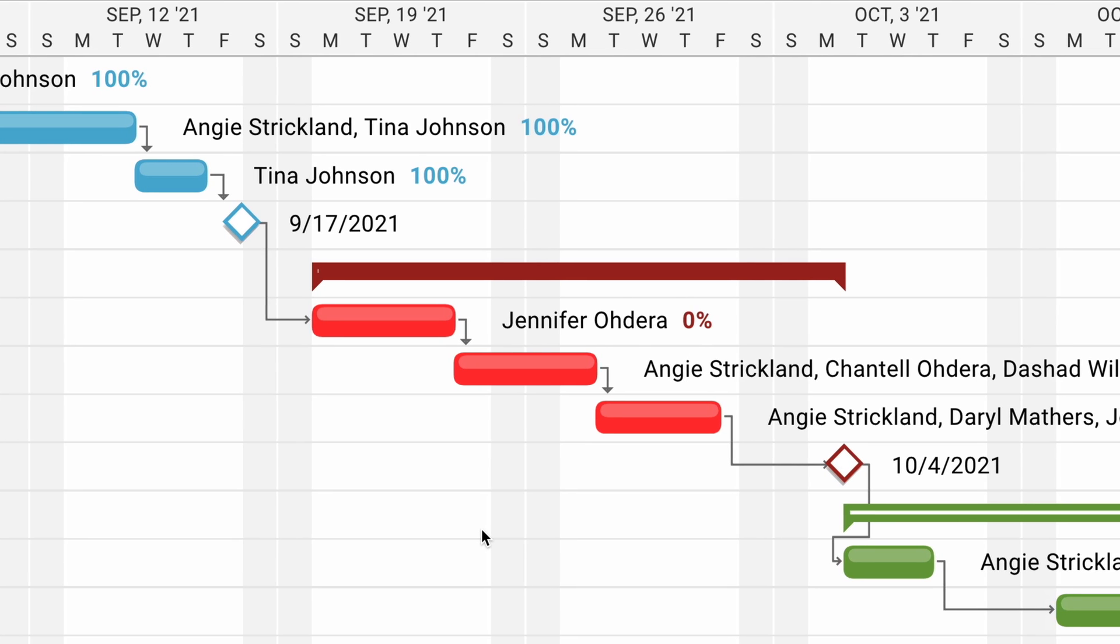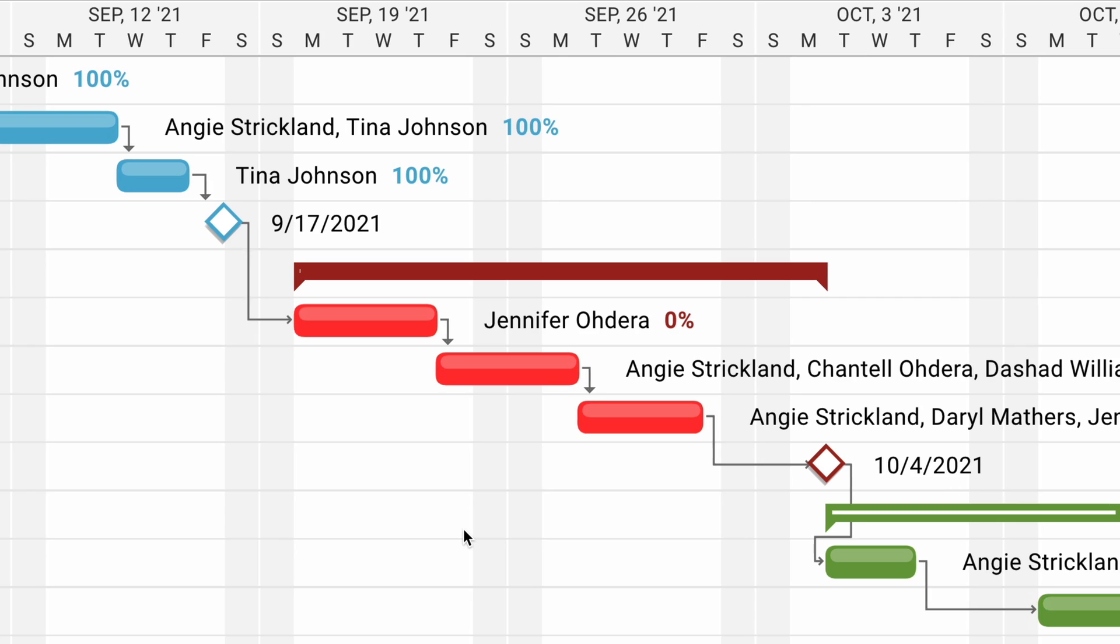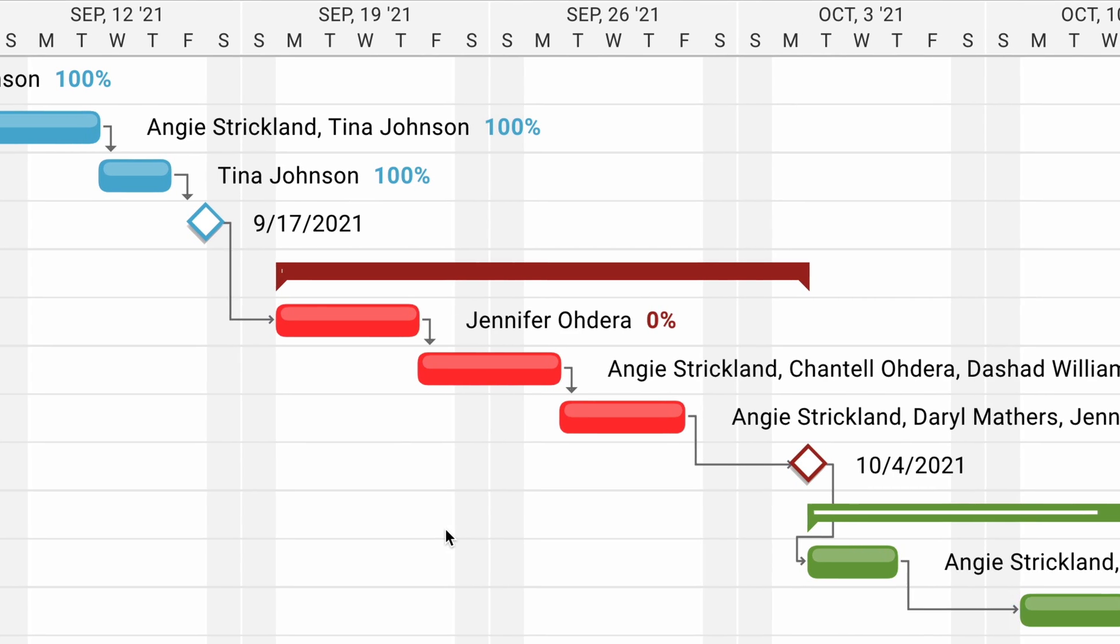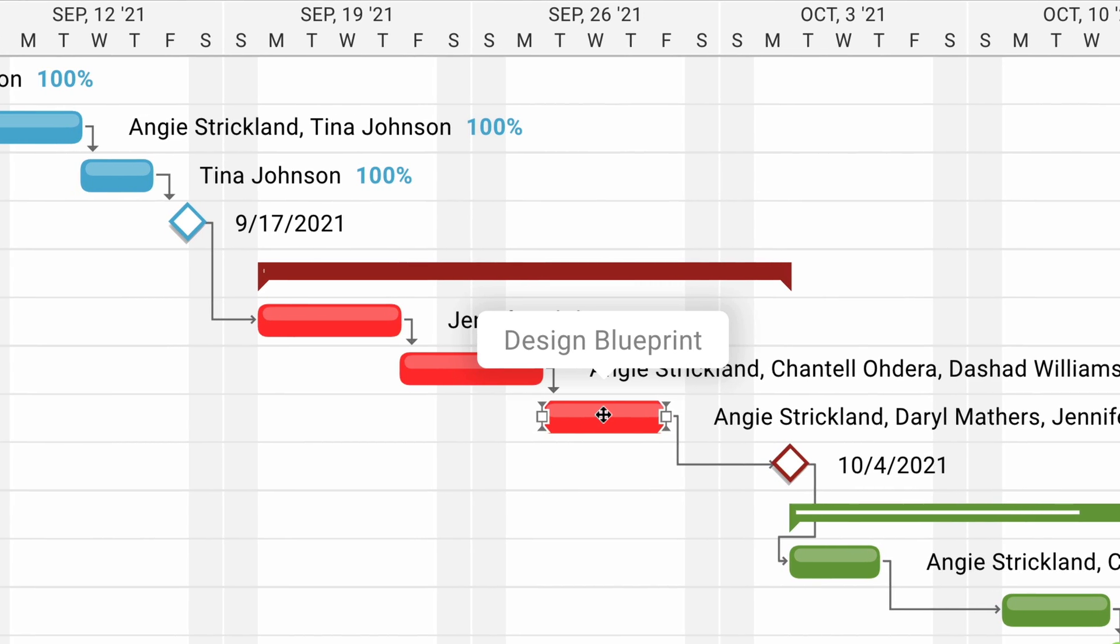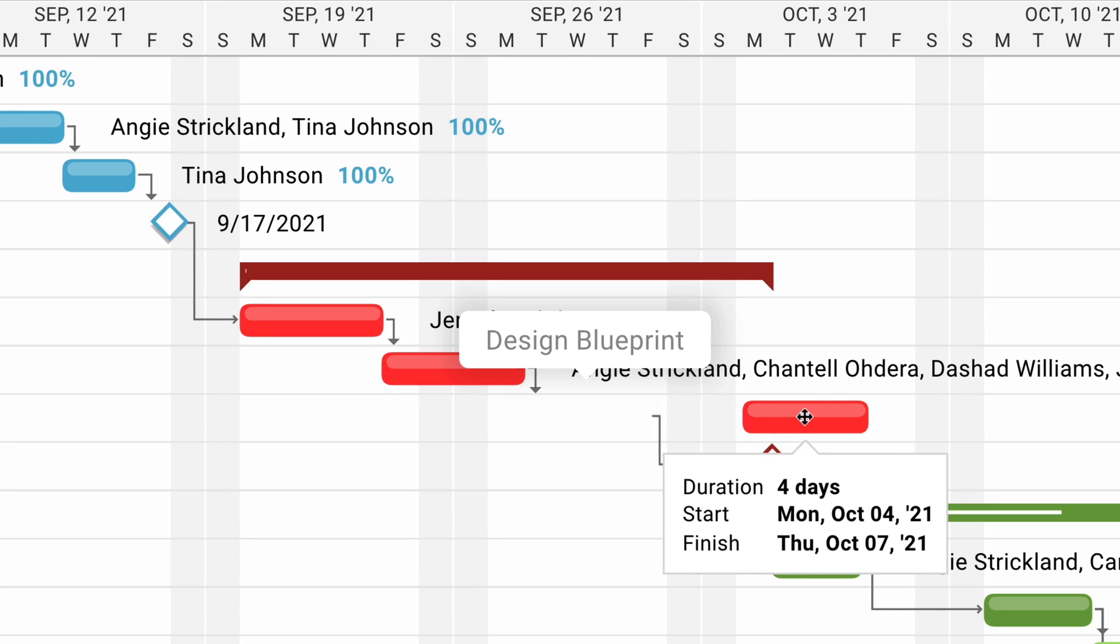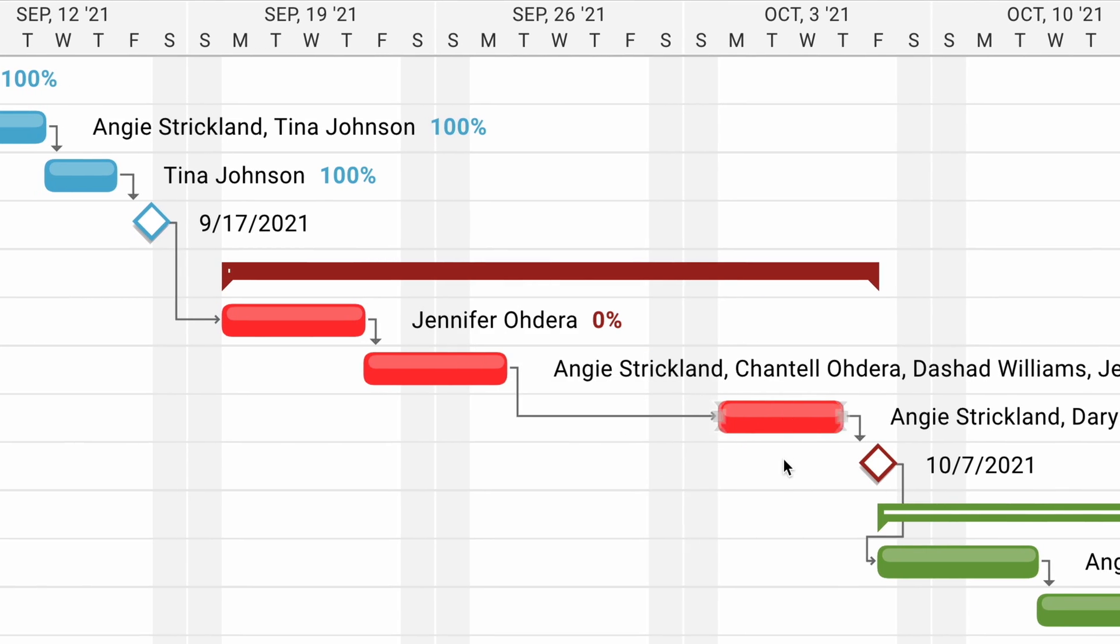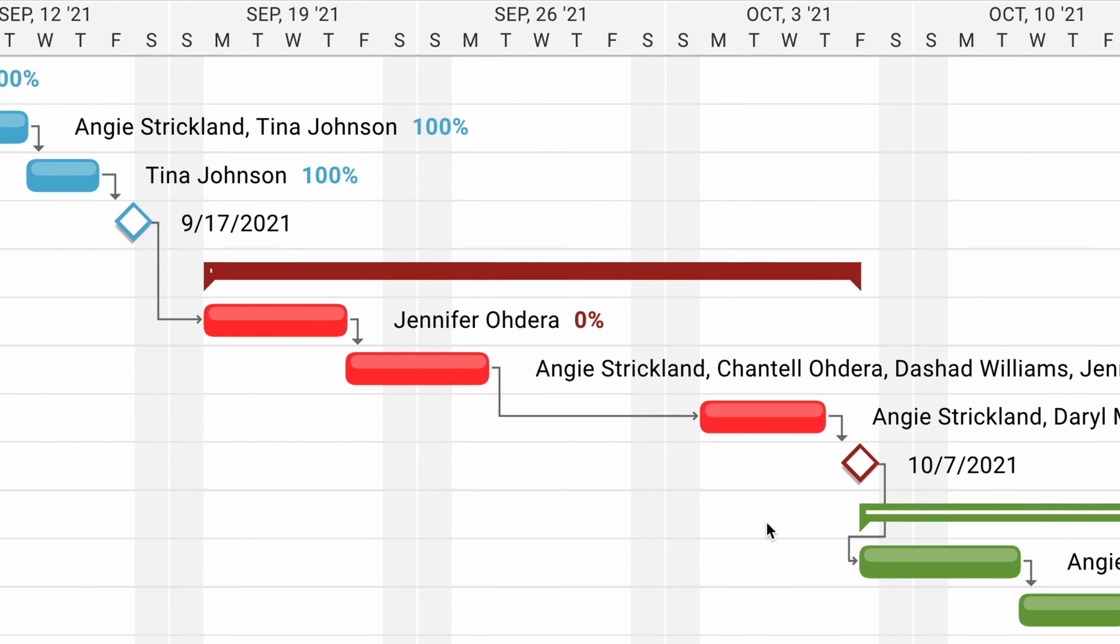And of course, no plan is perfect, and flexibility is built into the software. Dates are adjustable with drag and drop, and the rest of the schedule will update automatically so you can clearly see the impact to tasks that are dependent on each other.